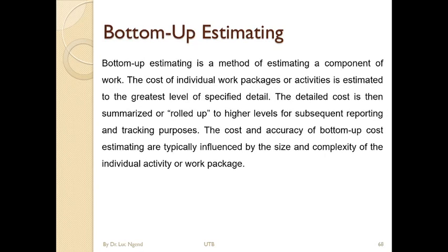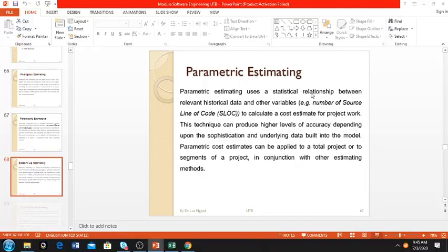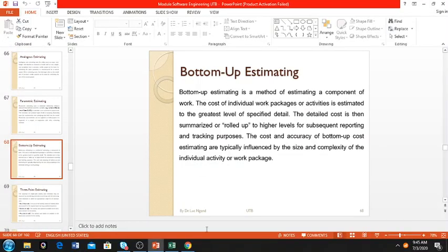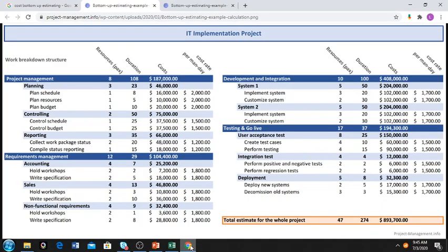Now, bottom-up estimation, just like you understand: you break down your project, and then you estimate different work packages, and then you sum up the cost.